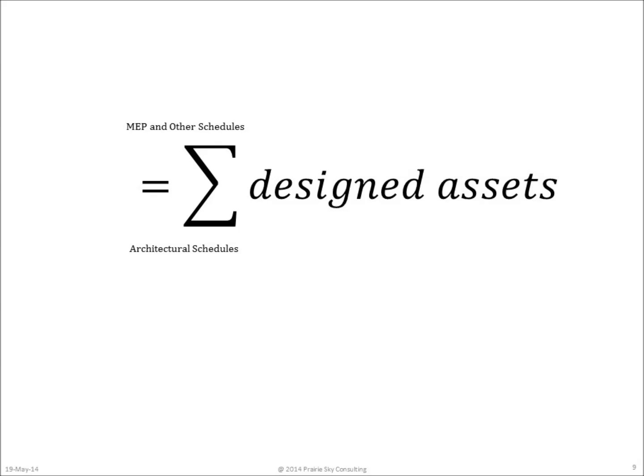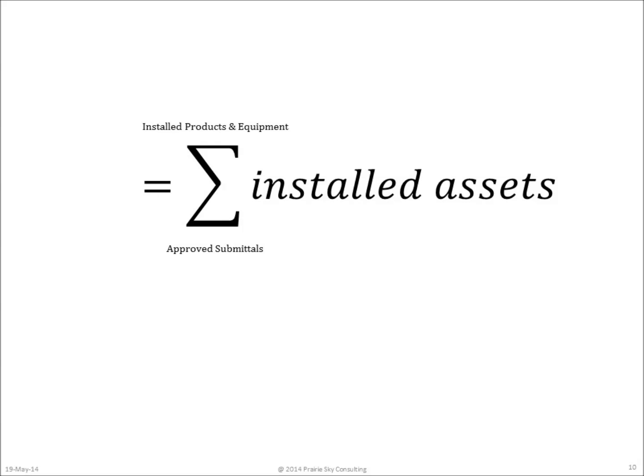During construction, the builder simply fills in the outline of all of the designed assets produced at the construction document stage. The outline is filled in with the attached documents from approved submittals, as well as specific information about installed products and equipment.